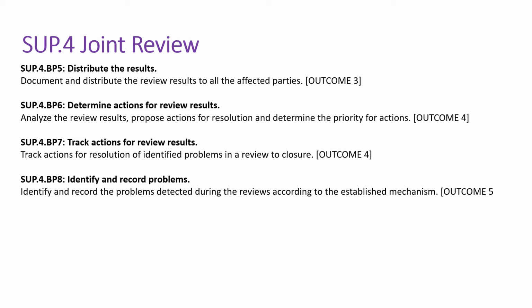So BP5 talks about distribute the results. So after recording, you need to track those action items to closure. So before writing it as closure, you need to circulate the MOM among the meeting participants. So this is the distribution of results, and determine actions for review results.